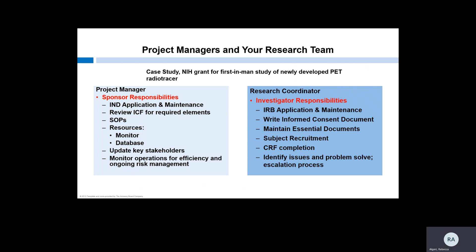Let's take a look at how the roles of the CTPM and the research coordinator differed on our case study. This study team decided to divide responsibilities based on what fell under the sponsor versus what fell under the investigator. The study team felt confident in how to support the PI in his role as the investigator and sought the CTPM to support his IND sponsor responsibilities. The CTPM took on everything under that sponsor umbrella, starting with the FDA communication, like the initial IND application and all of the maintenance processes. The research coordinator took on everything under the investigator umbrella, like IRB correspondence. Throughout, the CTPM kept a watchful eye on how the study was progressing, anticipated the needs, and managed risks.